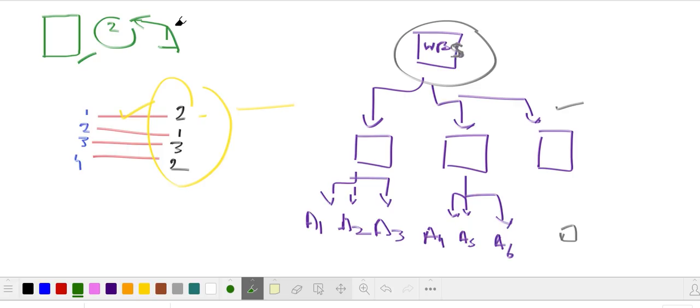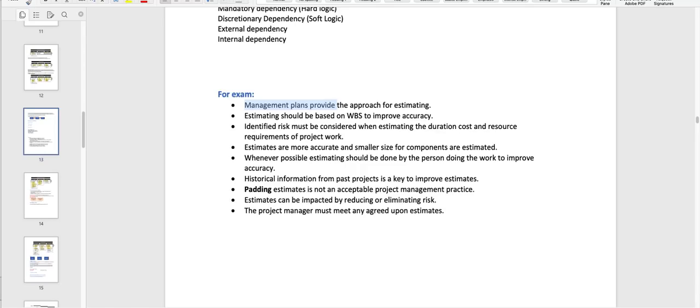And so that was pretty hard, and because he didn't realize the risk out of it, he couldn't give a better estimation, and that's why the project was delayed. So whenever you are asked to give the estimation of any activity, doesn't matter if you're a designer, developer, or tester, you have to consider a risk. And this is the project manager's responsibility to make sure they are taking care of the risk and everything else while doing an estimation, doesn't matter which approach they are using.